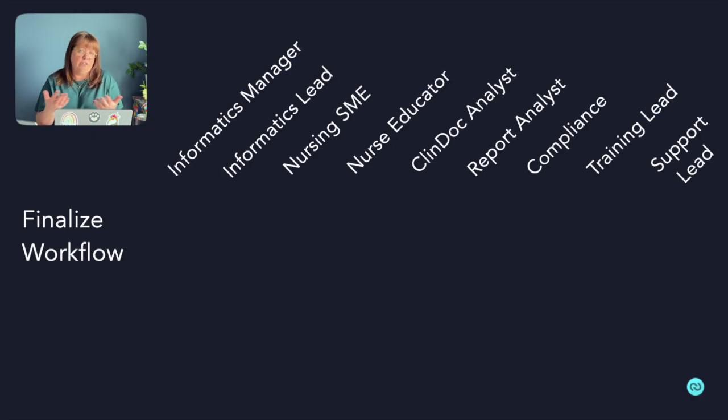The goal is really to clarify the responsibility for various pieces of work when there's multiple teams that need to coordinate with one another. So let's say you have some regulatory changes that you need to implement, and they're going to be impacting ClinDoc design. So there are new fields that end users need to capture in order to meet some sort of regulatory reporting requirement. You may have the informatics lead be the responsible party and document it on the RACI as the one that is responsible for making sure that the finalized workflow is signed off by the operational team.